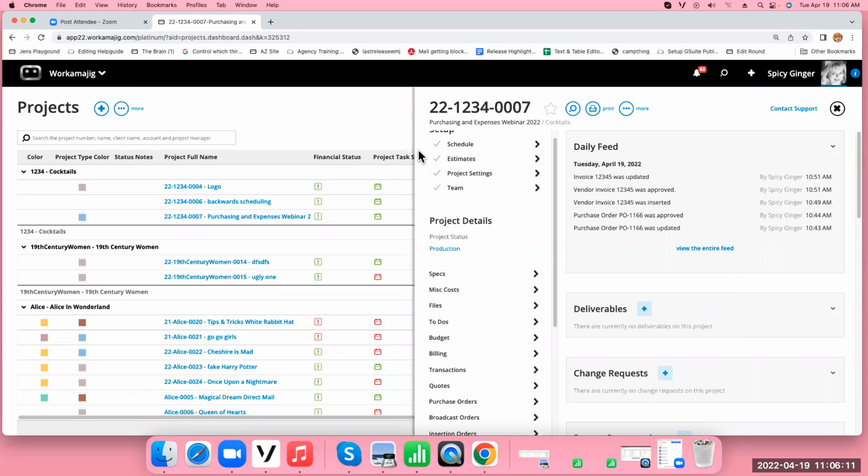You can make a change order, add that new item, approve it, and then you'll have 2 approved estimates. You could unapprove an estimate if you forgot something, if you have the security right to unapprove it, and add it back on. But of course you would want to tell your client that this is fixed fee, this is what we're billing. Otherwise, that wouldn't be good practice, just randomly. I didn't mean to say you should randomly add other expenses on later.